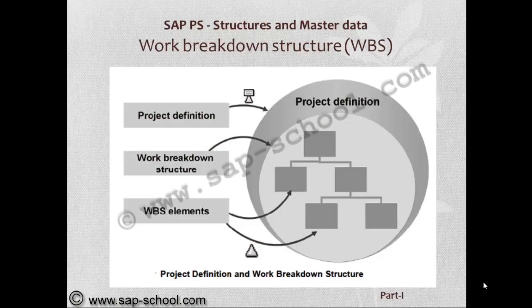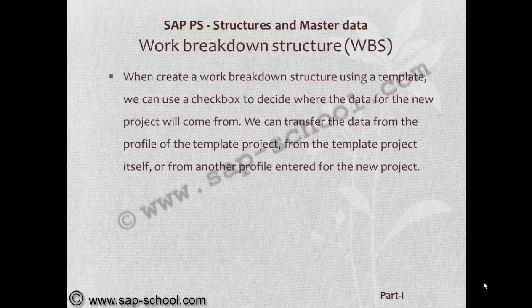Like you can see here, this project definition is the header for the work breakdown structure, and the default values from the project definition will be inherited to the work breakdown structure as well as the WBS elements. When we create a work breakdown structure using a template, we can use a checkbox to decide where the data for the new project will come from. We can transfer the data from the profile of a template project, from the template project itself, or from another profile entered for the new project.